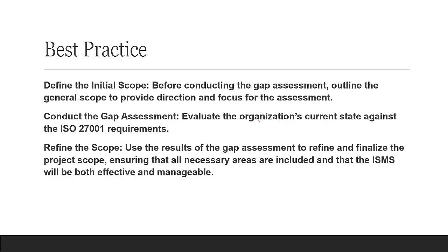Is it clear? One more important thing: when you're talking about the project initiation document, along with that, we also submit the business case. So first we submit the business case, explain to them why this is important, and then we submit the project initiation document. So the business case is the initial presentation, and then we talk about the project initiation document. The sample I have shown you is a sample of a project initiation document. So let me show you the business case sample also, so you get better visibility.